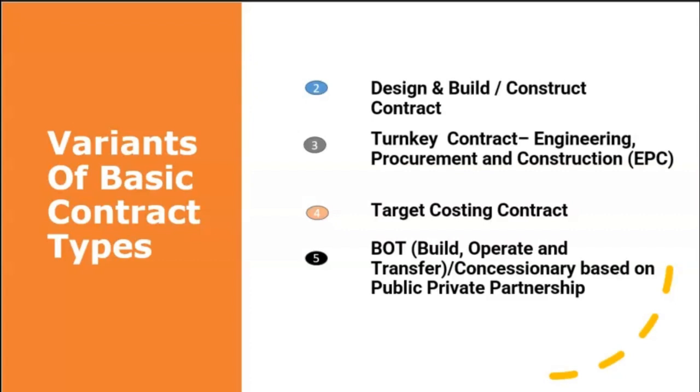In drafting the concession agreement, the employer must consider the use of land, existing properties, design and performance standards, environmental requirements, risk sharing, regulation of tariffs, subsidies, if any, and other public sector financing, operating and maintenance requirements, conditions of facilities at transfer and the transfer price. Provisions for possible extension of concessionary period should be considered also.